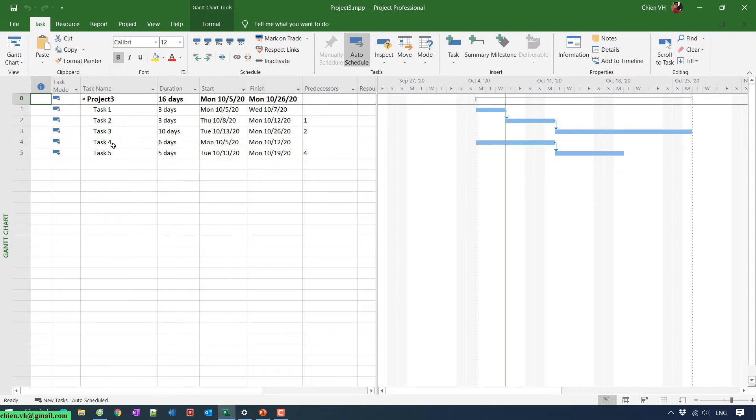What I mean by milestone - the milestone is something where we have the duration of zero, and after we finish some work in our project, for example we have some decision session to show the demo with our client, so we can call it a milestone in our project.